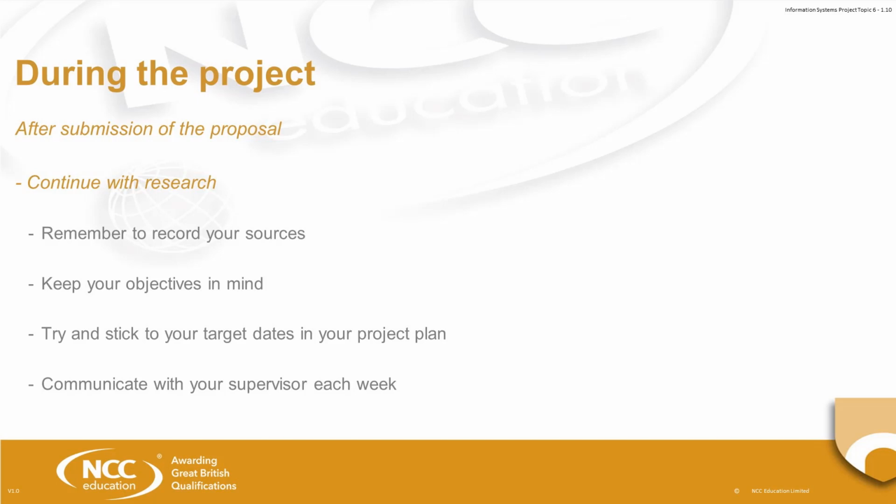So when you were writing your project plan, you were kind of guessing. Maybe it was an educated guess, but it was a guess. So you shouldn't feel too disheartened if you miss your target dates. You should try and stick to them because they are quite important, and certain dates, like submitting reports, are, as I've said, unmovable. But don't get too disheartened if you miss your own targets, but even so, still try and achieve them. When you do miss target dates, you should also write down why it is you've missed it and what you've learned from the experience. Okay, all the things that go wrong on a project are a very valuable experience, so you should write down what it is that's gone wrong and how you would solve it next time. And those things will end up in your final report.